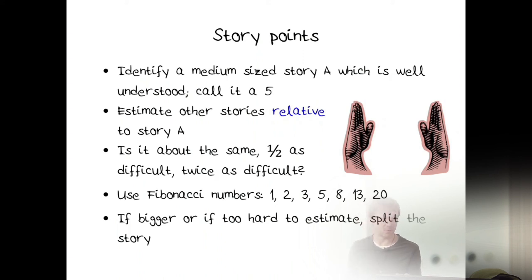And there's more to it. For some reason, they use the Fibonacci numbers here, except for 20. I don't really know why, but they use the Fibonacci numbers as the available sizes, available story points. And they cannot be too big.